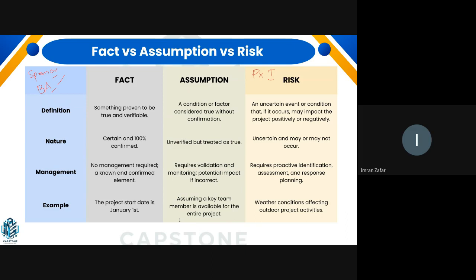In predictive, the lessons learned discussion is generally done at the end of a phase or the end of the project. But in Agile, the retrospective is done after each iteration. So again, in that setting, you also talk about risk. And in Agile, one advantage that we have, since, as you rightly mentioned, predictive is for a longer period, so the risk identification is done more holistically at the start, and then you keep monitoring it.